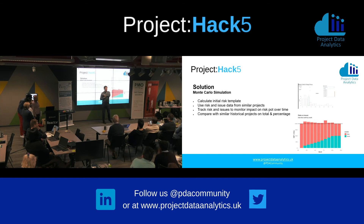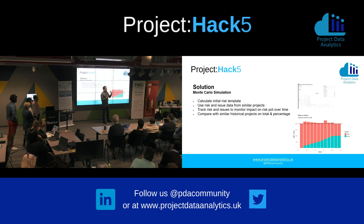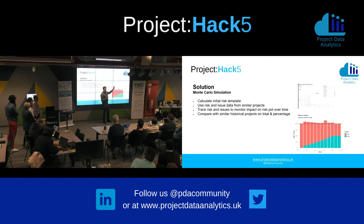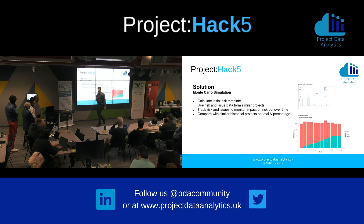We wanted to take it a little further in some of the directions previously discussed: applying historical data, categorizing things so that you could do more machine learning analysis, and looking at risks and issues. Our goal was to not just have the risk data, but also have issue data so that at the beginning of a project you can see what your risk is based on your confidence level, and then over time some of those risks become issues — you can continually monitor them and see if you're keeping on track with respect to your target.